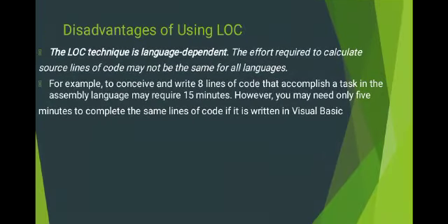Disadvantage of using the LOC technique. The LOC technique is a language dependent technique. The effort required to calculate source lines of code may not be the same for all languages. For example, to conceive and write 8 lines of code that accomplish a task in assembly language may require 15 minutes. However, you may need only 5 minutes to complete the same lines of code if written in Visual Basic. Means the LOC technique totally depends on the programming language.